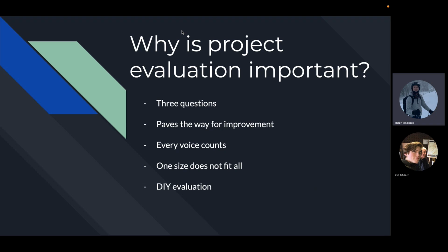And then at the end, one more is do-it-yourself evaluation, because that's also possible. Although a full-blown evaluation may be complex and external evaluators may not be in your budget, a project team can look for opportunities to weave evaluation into other activities. For example, you can consider adding a question or two to another survey you may be fielding for a different purpose, or if you're planning discussions about roles and responsibilities, consider adding a probe on what worked well and what might even work better.